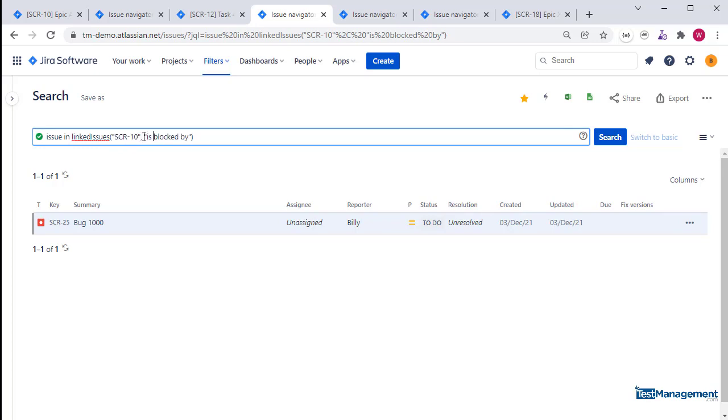Again, this JQL comes with some limitations out of the box in cloud Jira, and that is that it only returns results for one issue. You can only specify one issue in the linked issues function.